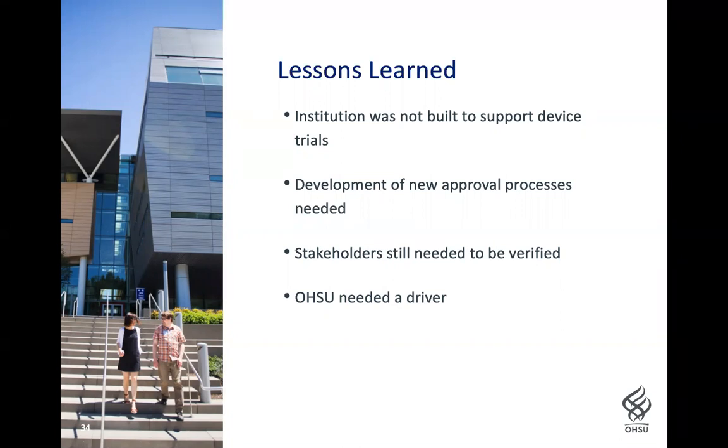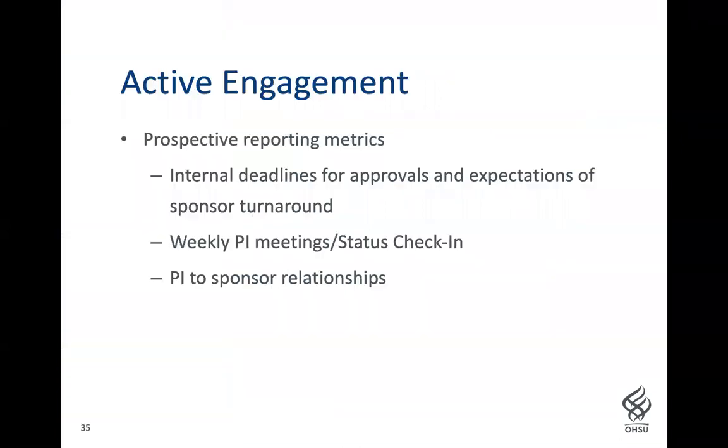And lastly, OHSU really needed a driver to push these processes forward. That's when the Cardiovascular Institute stepped up to the plate, and we did what we could to put some better processes into place. The first thing that we tried to tackle was the concept of active engagement. So instead of sending something out to another entity, whether that be another department within the institution or the trial sponsor, we wanted to make sure that we set clear expectations with turnaround times for those people. And if we didn't hear back from them in a certain time frame, we would be following up and asking, where are we at in the process? What can we do to continue to push this forward?